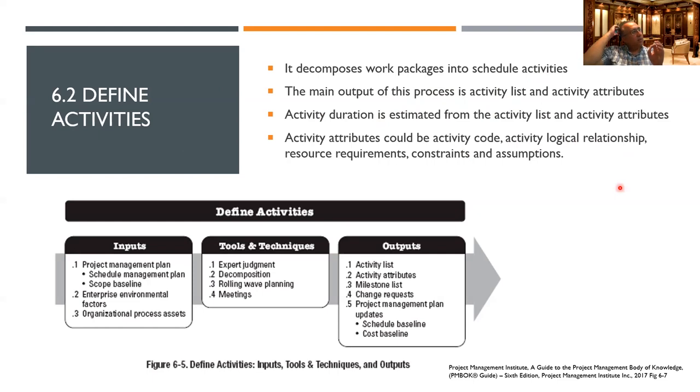So before you select the date and the center, right? You cannot go and check the center out until you select the dates. Only once you select the date and the center, then you can go out and see where the location is. There's a logical relationship, right?